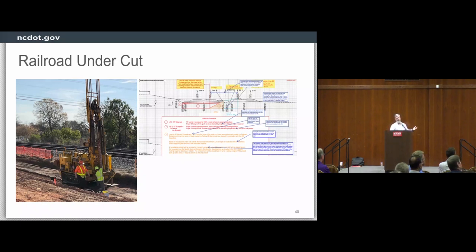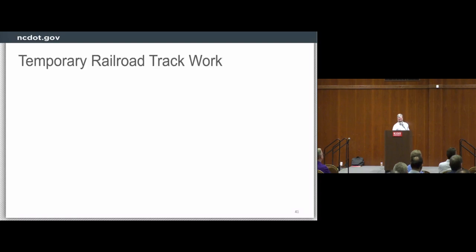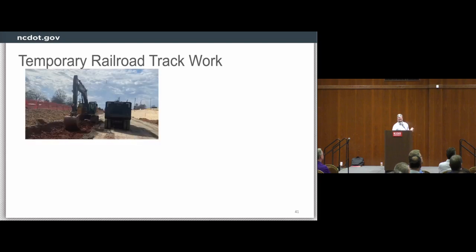So you're talking about a 20-foot trench box, maybe two of them side by side, whatever you can dig out to a 5-foot depth, whatever you can compact back. That's what we were doing in a day's time frame through this whole corridor, which was a couple thousand feet long. Once we got this done, we could lead to getting our sub-ballast installation put in, which is really the scope of what our work originally intended to do.